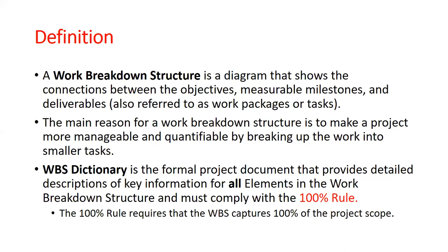And under induction, you have a workshop, and someone doesn't really understand what this workshop is all about. So we can create a work breakdown structure dictionary to give you all that you need to know about the workshop. So we now tell you, okay, the workshop is a 3 or 5 days seminar that will involve this, will involve that, and all of that. We give you the complete breakdown, the complete information that you need to have on that task called workshop, under induction, under the whole professional development journey. All right? Okay.